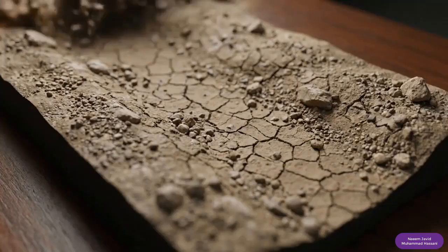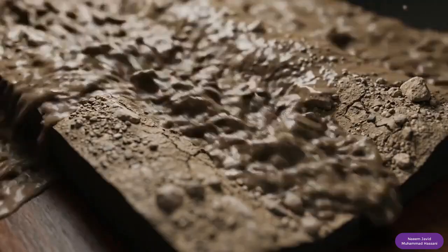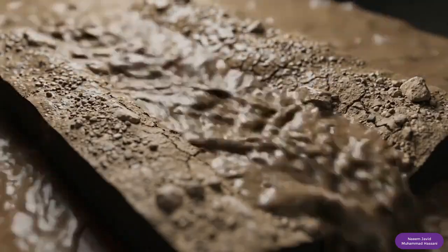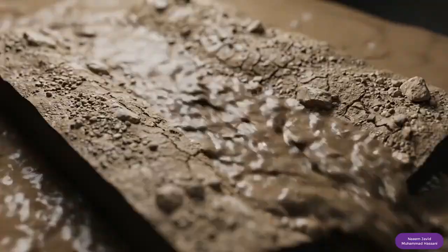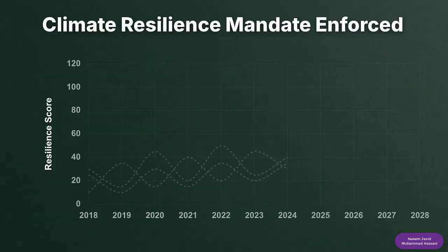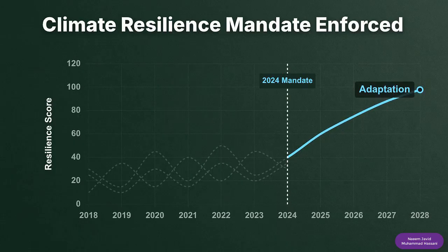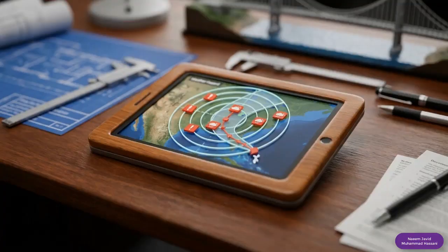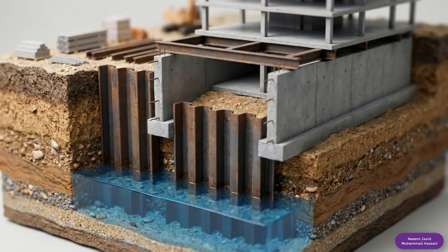Infrastructure must be resilient to local conditions. A region can shift from severe drought to a flash flood in a matter of months. Because of this volatility, the 2024 manual update mandates the inclusion of assessments for climate change adaptation, mitigation, and co-benefits. This requires running a CIRA, a Climate and Hazard Initial Risk Assessment. Disaster risk reduction must be woven into the project appraisal at every level.